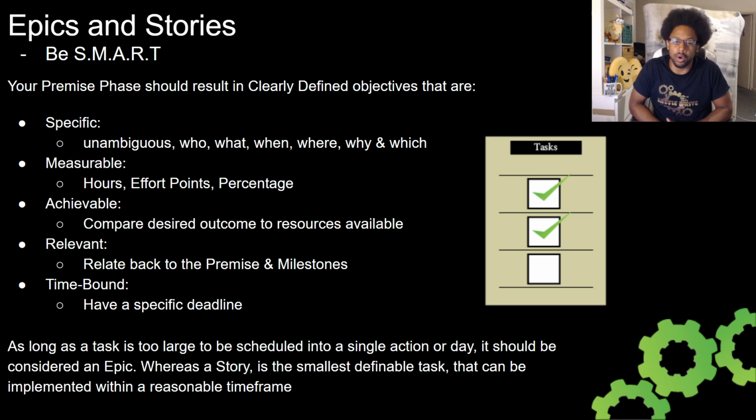So that's why only add things that you can achieve. If somebody is trying to add something that can't be achieved or is unrealistic, make it clear to them. At the very least, make sure that that objective is a low priority, in the sense of everything else will get done first, and then based on the amount of time we have left, we'll try and fit this in at the end. Never make it a priority when it is something that you're not even sure can be done. It will waste so much time and it will be very damaging to productivity. So that's why achievable is an important one to take into account.